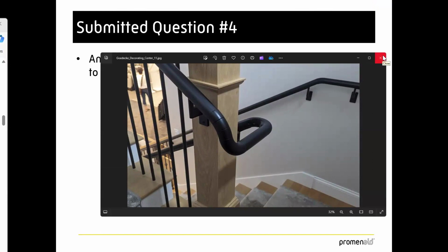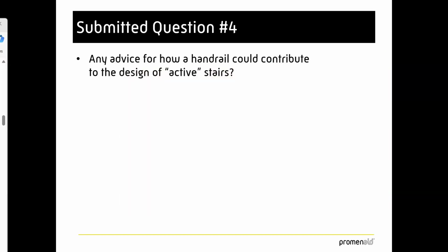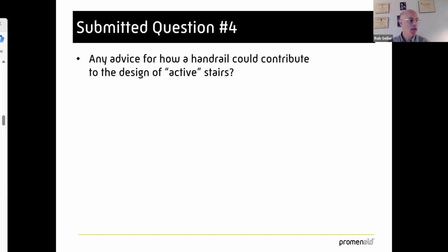While you're saying that, Rob, someone did ask about lead time, and I did type an answer, but if we want to answer for the group about lead time. Sure. Now, there's a couple of different lead times. One is when we first get the architectural plans, we do a takeoff, a render, and shop drawings, and that's all done usually within a few days, depending on if all the information is in the plans. The other side of it is lead time to deliver the product to the job site.